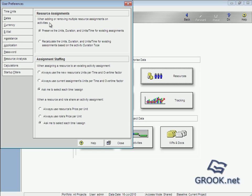Here if we add or remove resource assignment to activities, to preserve the unit duration or recalculate units and duration.